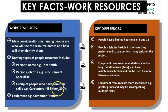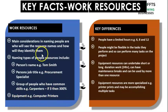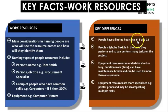You also have equipment, like a computer printer, as a work resource. The difference is that people have a limited number of hours of work — they can work six, eight, or twelve hours. If they work twelve hours, four hours will most likely be overtime.